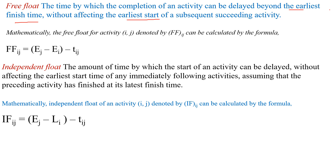Independent float is the amount of time by which the start of an activity can be delayed without affecting the earliest start time of any immediately following activities, assuming that the preceding activity has finished at its latest finish time. Mathematically, independent float equals Ej minus Li minus Tij, where Ej is the earliest time at event j and Ei is the earliest time at event i.